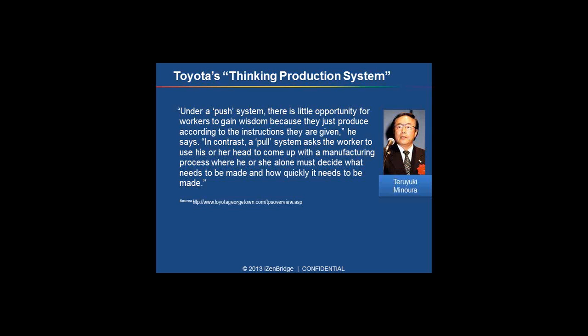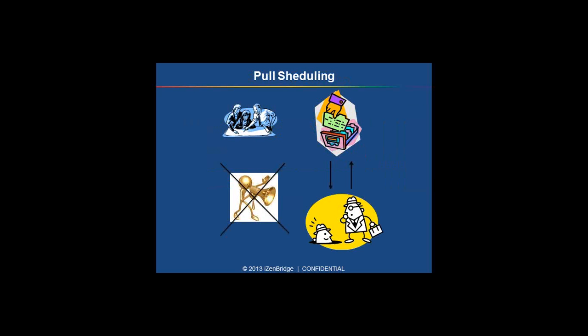Now, how does it work? You may start with a planning meeting. So project manager or other leaders along with the team, you may do a scheduling meeting where you identify what all work is required to be done in a given duration. On the basis of that scheduling meeting, you may come up with a collection of tasks, and these tasks can be looked at as a ticket item or a Kanban item or cards.